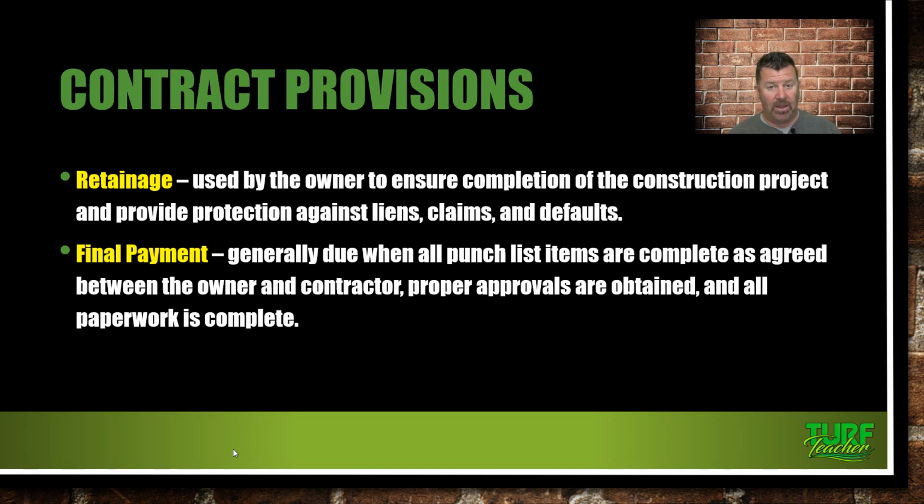Now, they also may ask you to sign a lien waiver before they pay you. I had a guy in the last Saturday seminar say, I don't sign lien waivers. I ain't doing it. Well, we've always had to sign them. You sign the lien waiver so you can get paid. That releases all rights to the property. Yes, it does. But again, you've got to have that trust with the builder. They're doing what they've got to do because they can't get paid unless they sign lien waivers themselves as well.